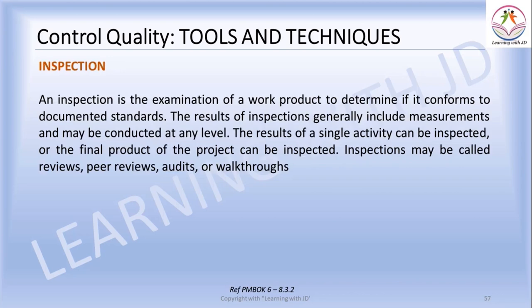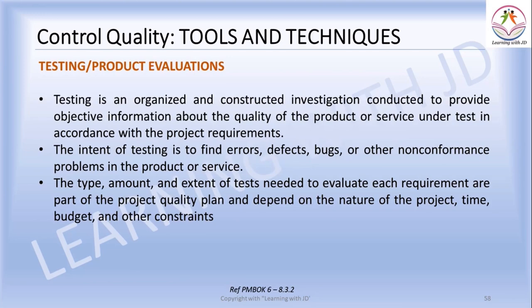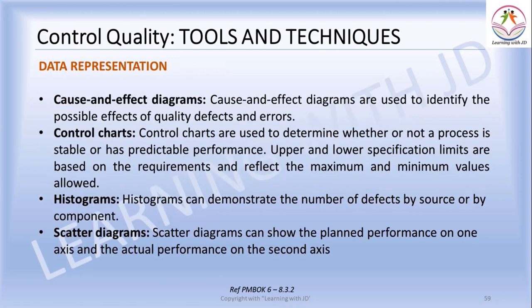Inspection — we did inspection at the time of execution as well. Inspection is the examination of the work product to determine if it conforms to documented standards set during planning. Testing and product evaluation is an organized investigation conducted to provide objective information about the quality of the product or service under test. The type, amount, and extent of tests depend on the nature of the project, time, budget, and other constraints. You can also use data representation tools such as cause-and-effect diagrams, control charts, histograms, and scatter diagrams.